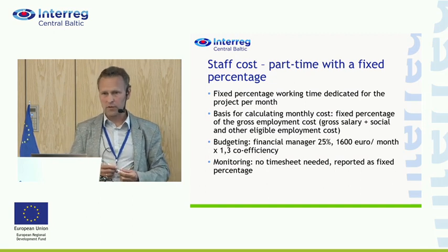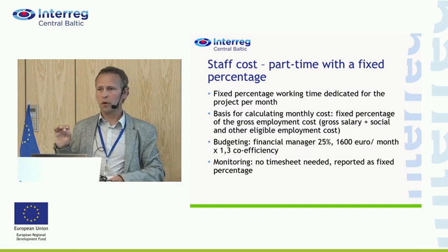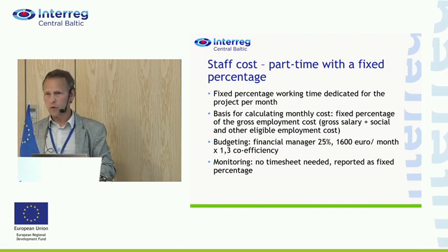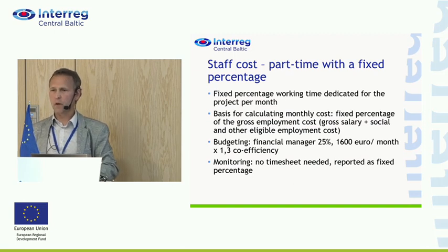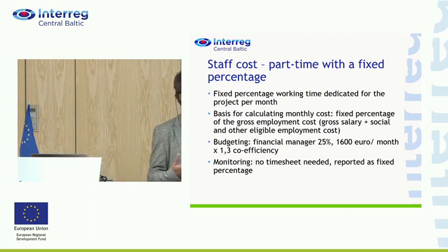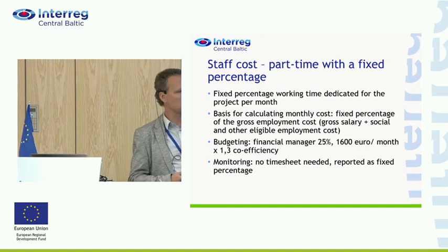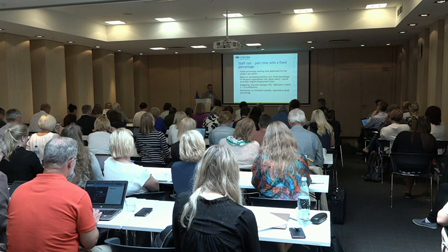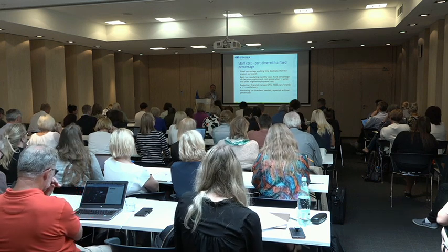If your organization requires timesheets, and you need to keep a very tight reporting system, then it's up to you and your employer and your organization, but you don't need to report them to us. And we have got questions: I need to report hours, so how will it be calculated into this part-time percentage? You just calculate it somehow. You evaluate how much work is needed for that task in the project, and you decide that it's 30%, for example, and it's fine for us. If it somehow doesn't feel very illogical, then we will ask questions.